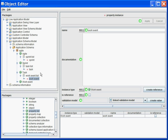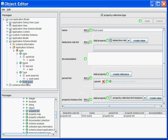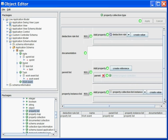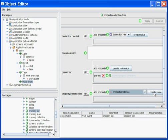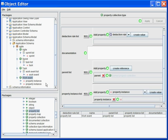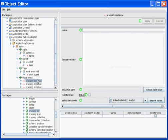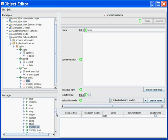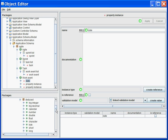Now, what does it mean to have a work event? A work event is really a date at which I spend some time, and there's also another field which will be used to track the amount of time I believe I have left to complete the task. I will create three properties. First will be the date of the work event.